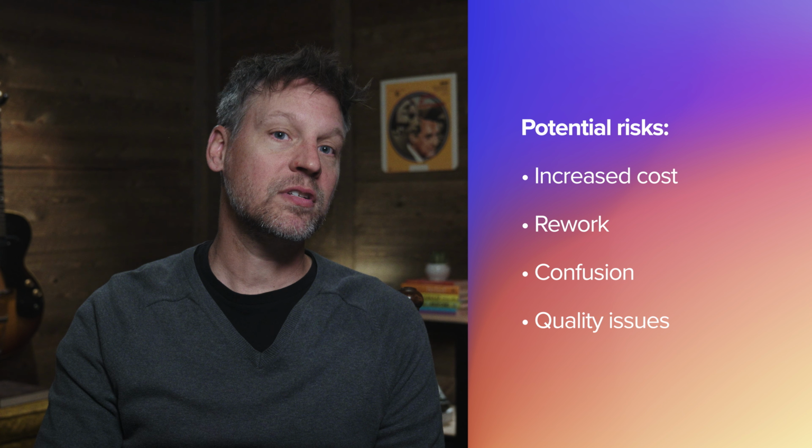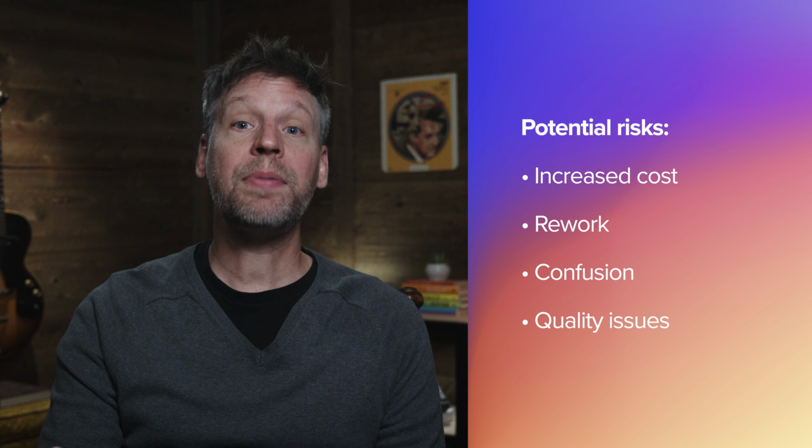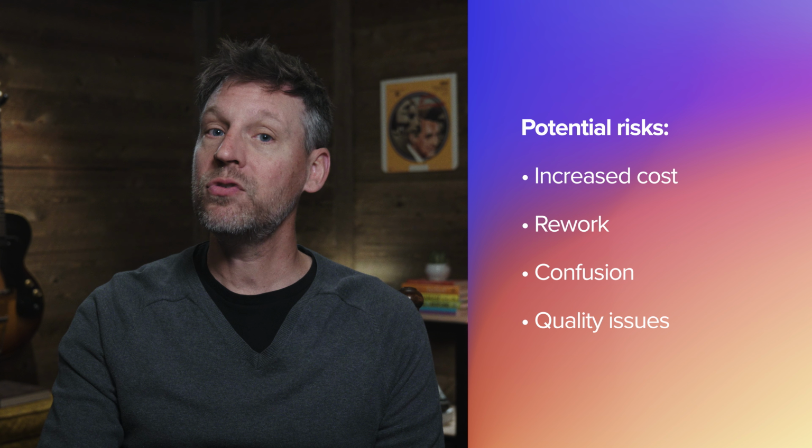Both can reduce project duration, but adding resources can increase cost. Overlapping work can create rework, confusion, or quality issues. Use schedule compression when the deadline is truly fixed, the tasks are on or near the critical path, and the risks are worth the payoff.